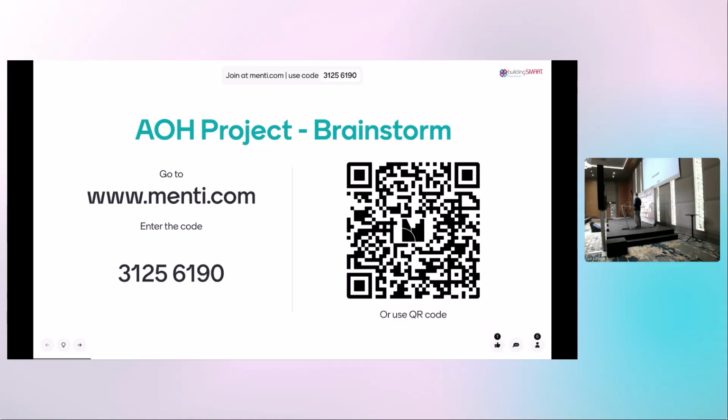Maybe I can share what we are doing in that case. We derived the information requirements from the asset operation and asset management systems. So we looked at those systems, asked the people who do the operation and maintenance, and then we have a set of properties, a huge set, I don't know, 5,000 or so, currently in BIMQ.